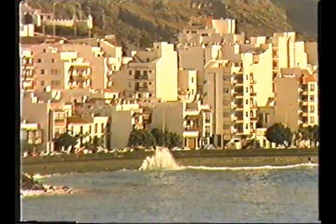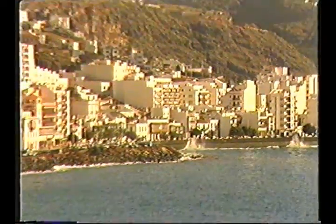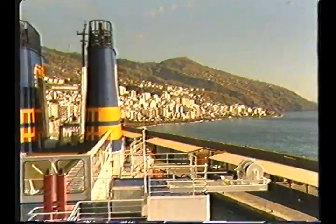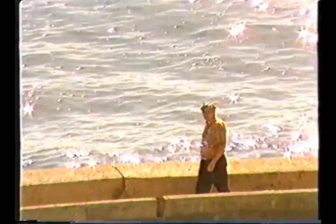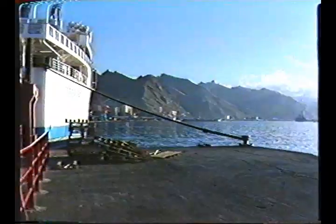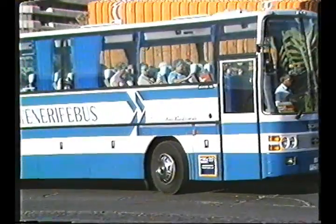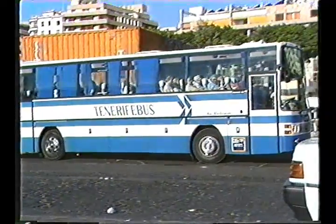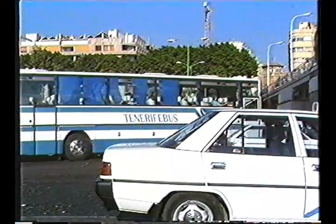Work continued with the passengers and crew scarcely knowing that the Regency Marine team were on board, and the Orient Express steamed unhindered from island to island. But when the ship made its weekly visit to Tenerife, the new materials had to be on the dockside waiting, and while the passengers were exploring ashore, the empty containers were unloaded to make way for the new ones.